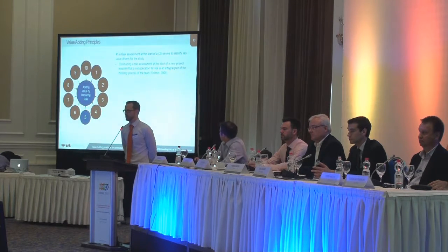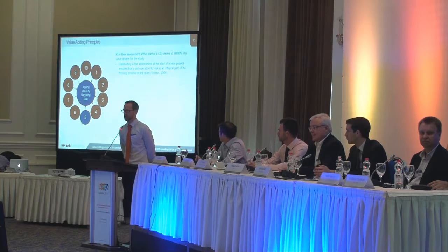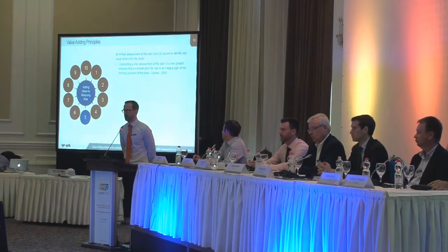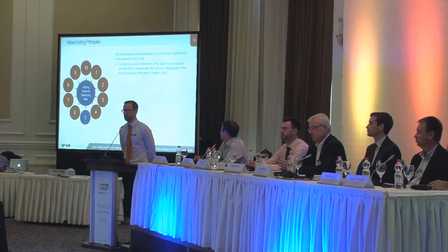The risk assessment should be done at the beginning of a conceptual study. Usually we leave risk assessments to right at the end of a study, but conducting it at the beginning helps you to think about those things that are important and add value right at the beginning. So it helps you to focus on the right things and focus on those things that would add value.